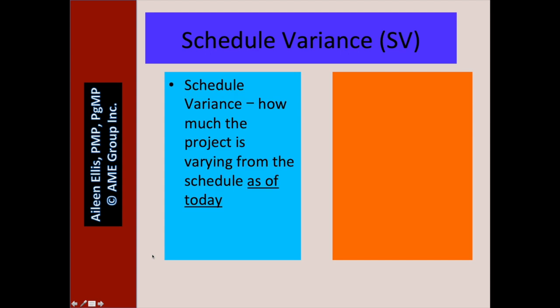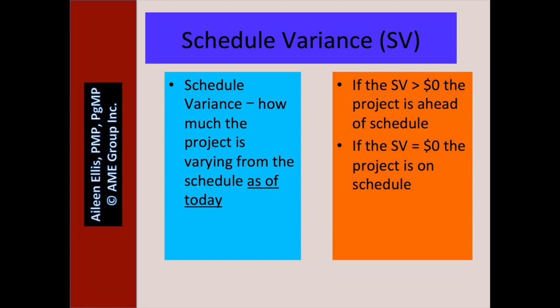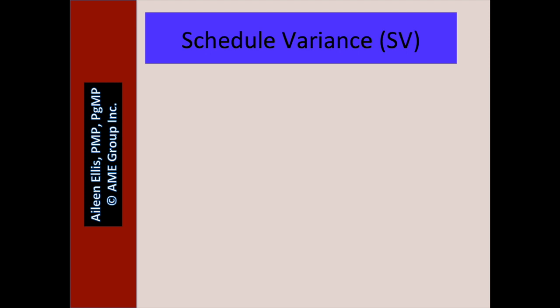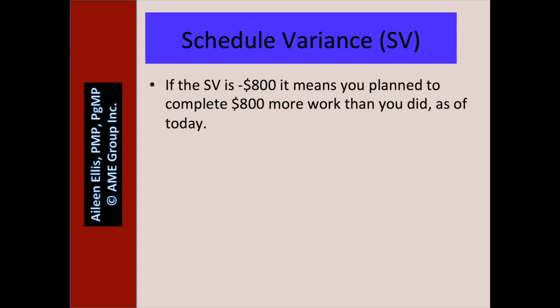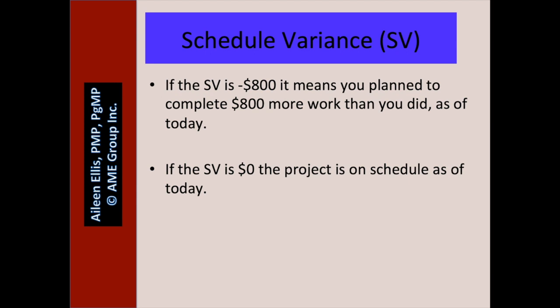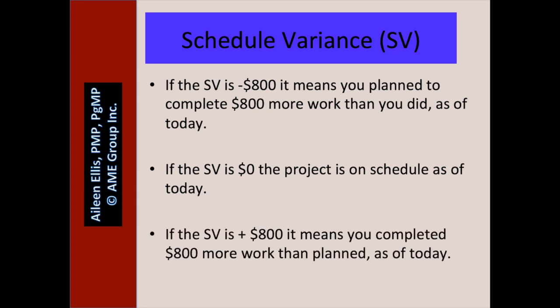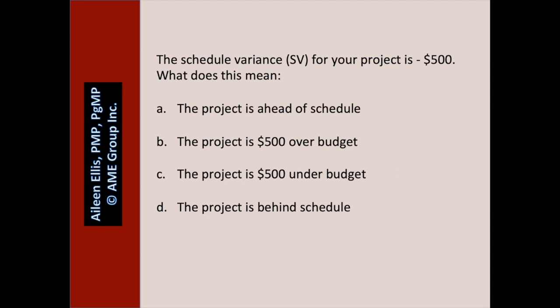Schedule variance — in my own words — is how much the project is varying from the schedule as of today. If the schedule variance is positive, the project is ahead of schedule. If the schedule variance equals zero, the project is on schedule. If the schedule variance is less than zero, the project is behind schedule. For example: if the schedule variance is negative $800, it means you planned to complete $800 more work than you did as of today — we're behind schedule. If it's positive $800, it means you completed $800 more work than planned as of today.